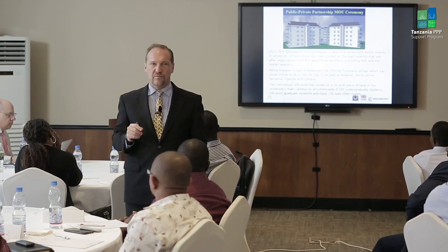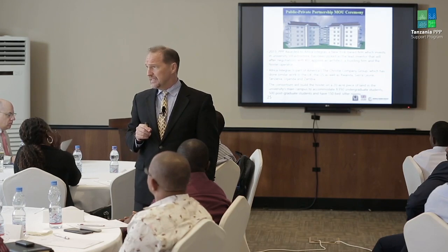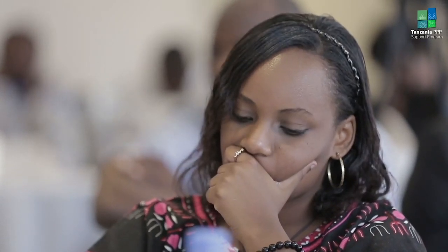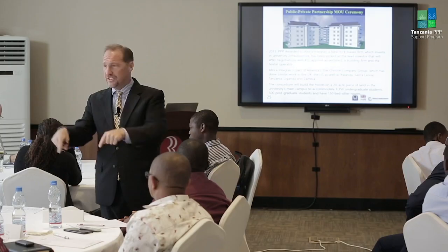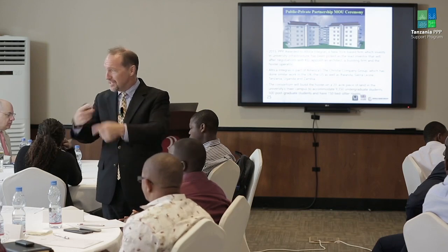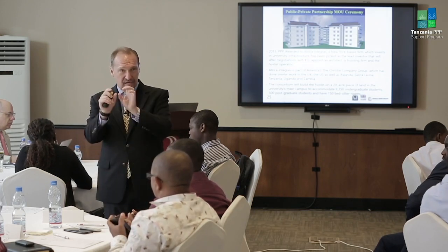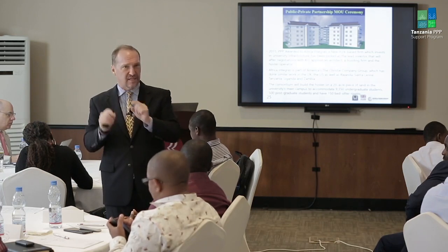They also don't typically have what we call a corporate guarantee. They can't say, well, if the developer hasn't paid me, I can go and take these other assets that are pledged as collateral. We say their only recourse is to the project itself. That's why lenders do such detailed due diligence and insist that all risks be identified and carefully allocated, so that even issues like what if you have a student who's occupying this and not paying, or there's student vandalism, or all these detailed issues. Or what if the government decides to close the university for whatever reason.